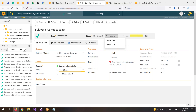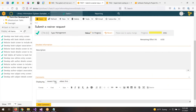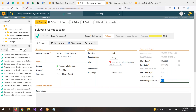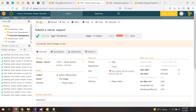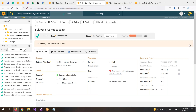We could assign this task to Fred, and Fred could start the task — this is the waiver request. A comment might be 'submitted the request, waiting to hear back.' We've spent two hours submitting the request and filling the form out, with three hours remaining effort. You can track how much time is spent on these tasks and the progress. That task is then tied back to that risk, and when you refresh you can see the task progress against the two different mitigations.